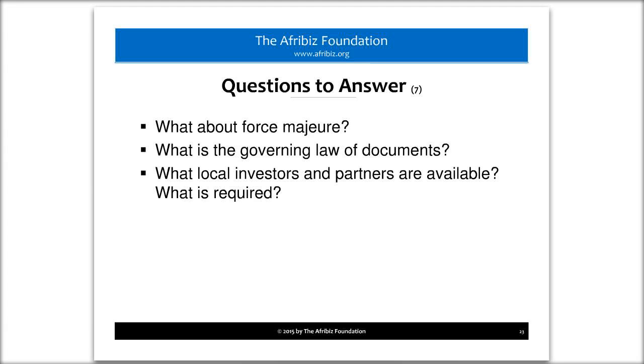So you need to understand what is proof of signature or agreement or authority. In some countries, for example, and I don't know if it's still the same in South Africa, but when I first went, you could not use a black pen. You had to use a blue pen to do your signatures, and then it's considered legal. So it could be something as small as that.